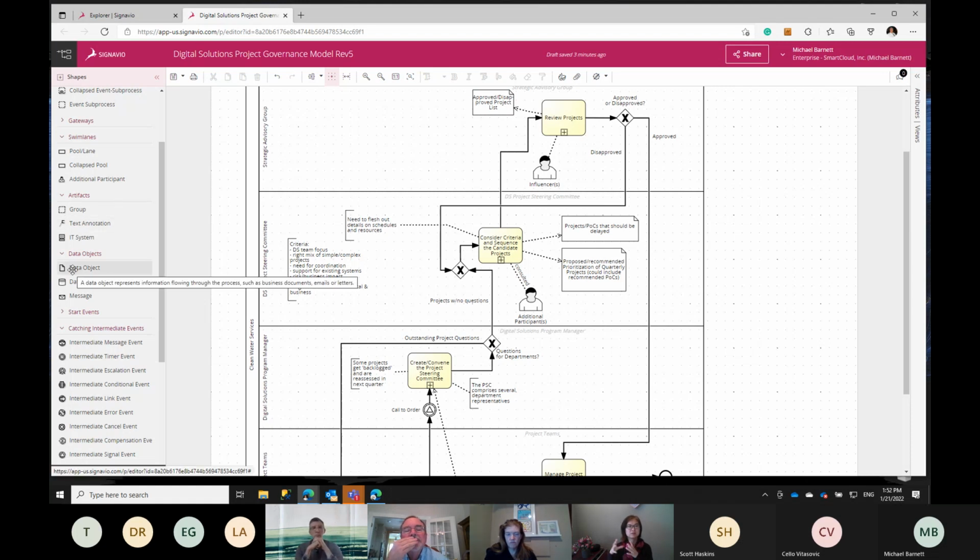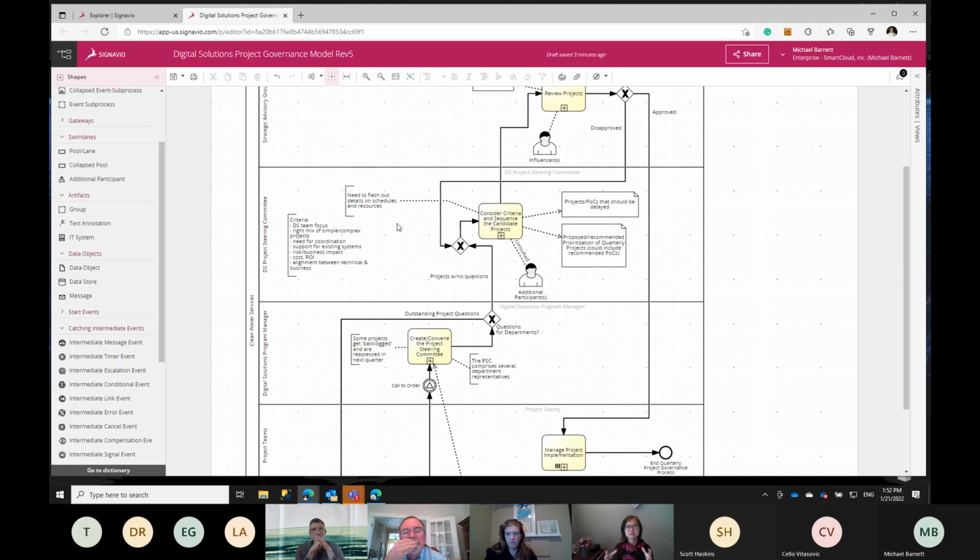Then we break that down into yearly or quarterly, and once everyone gets consensus, we set aside 40 or 60 hours a quarter on that. So the capacity is going to change each quarter. And then I have my IT managers doing capacity planning for each quarter as well on some of the IT projects or things that we have to do.